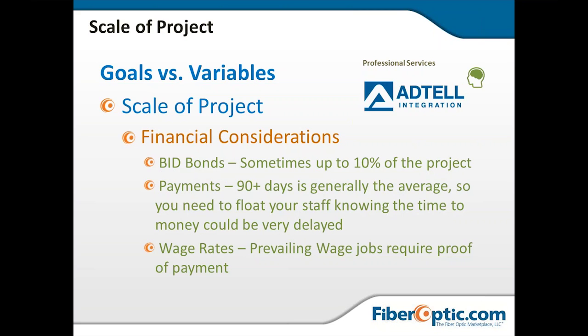The financial considerations: you've got to make sure you understand every county is going to have its own prevailing wage rate. So you need to know what that wage rate is for that county. You need to be able to look that up and make sure you're paying those individuals appropriately. If they do one job one day in one county and another job another day in another county, you have to compensate them differently.